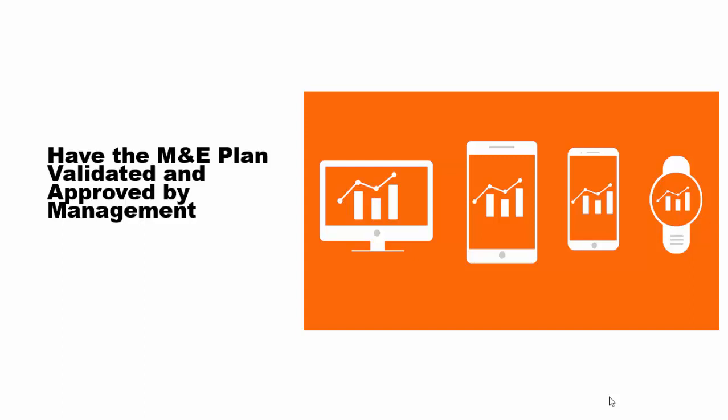So in other words, what I'm trying to say is that it might actually be good to have a workshop for reviewing the document, and then have another workshop where you validate. And validation means: have all the comments been taken care of? Is it indeed addressing the needs?